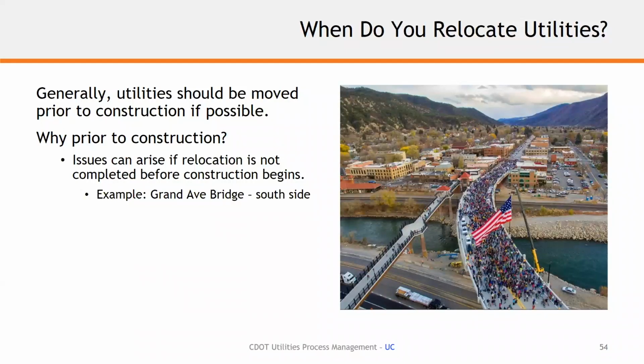No, I can't reiterate enough how important it is to relocate prior to construction. It just helps all facets of construction. If we can have our providers out of the way, we've already identified conflicts throughout the process, have the utilities there. Anytime we can eliminate a third-party entity that's in our construction site doing work, it just creates schedule conflicts and other types of conflicts.